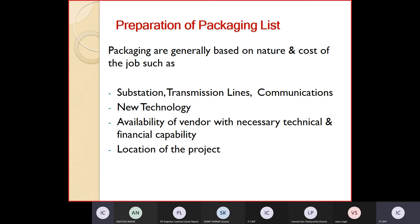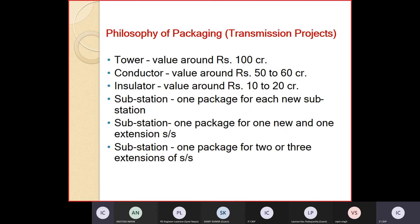Suppose you have a transmission project at some location - you have a transmission line. There may be tower packages, maybe more than one package. If you have a transmission line worth 2,000 crores and you give all 2,000 crores to one party, it will be very difficult to find bidders having that nature. They may have the technical capability - there are some vendors who are very good technically but do not have the financial capacity.